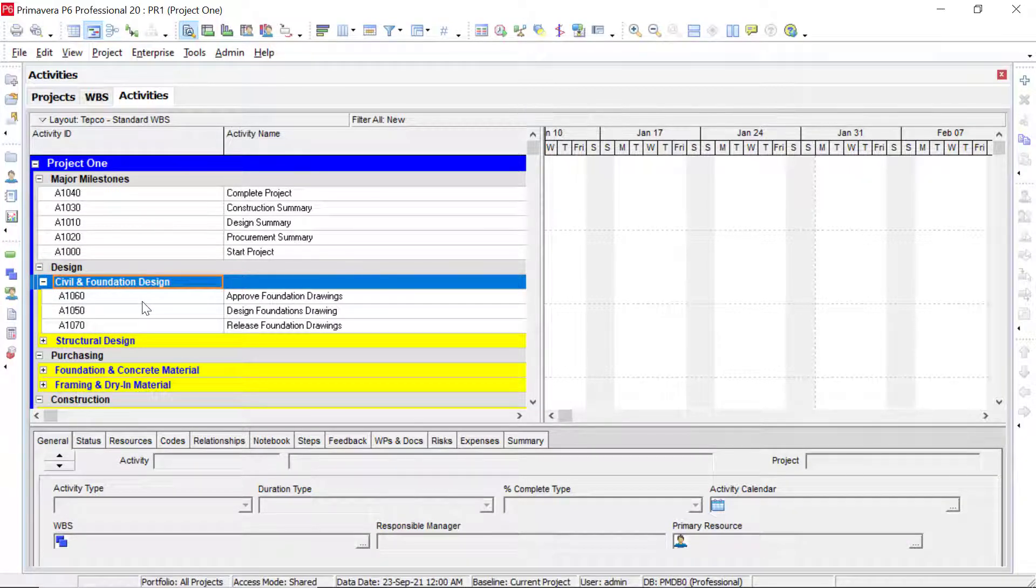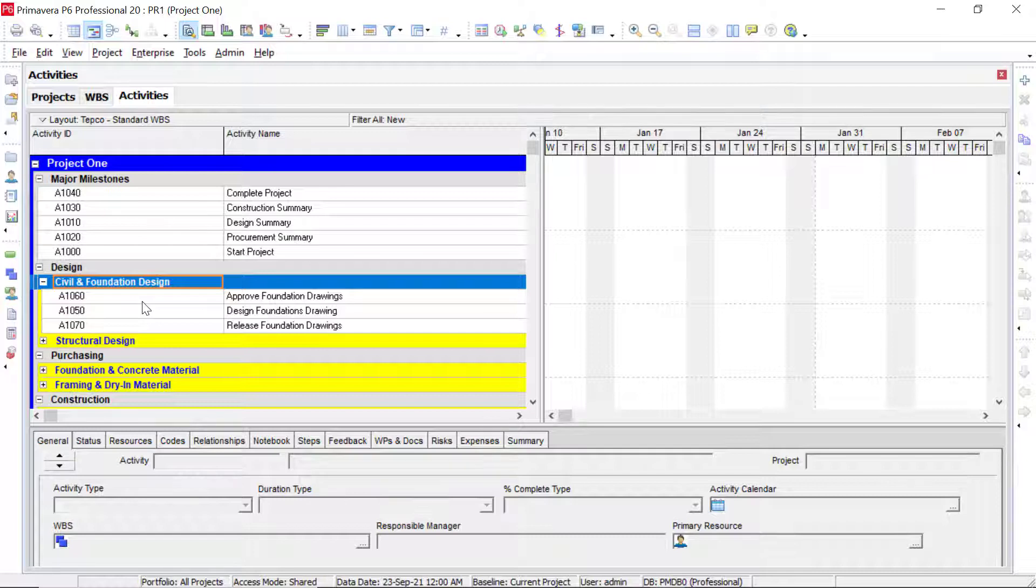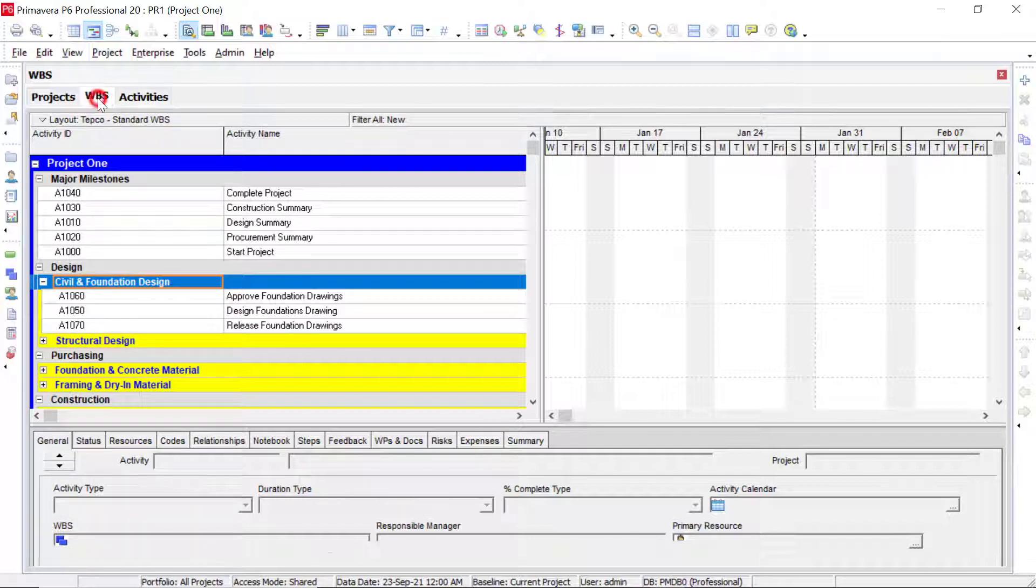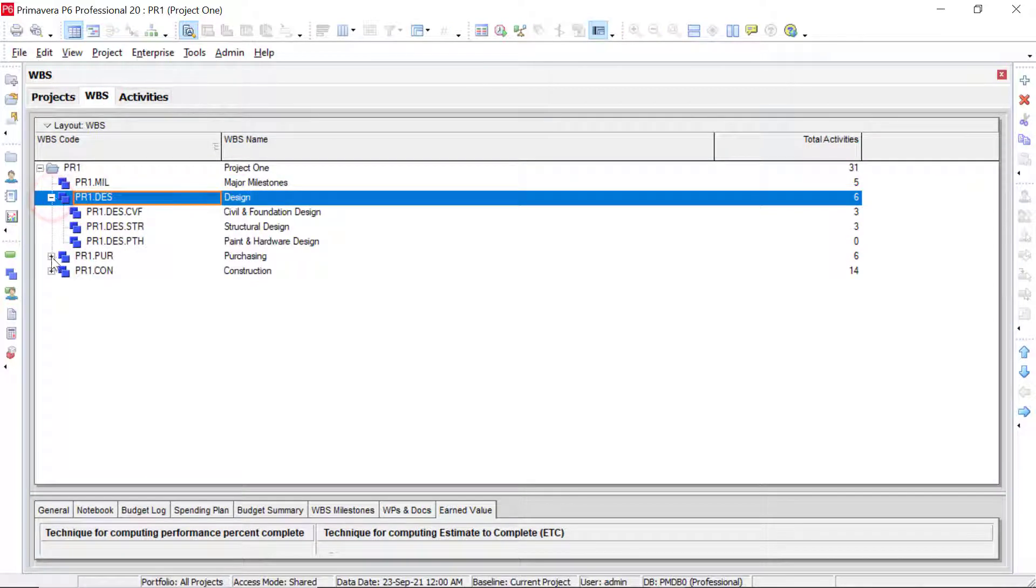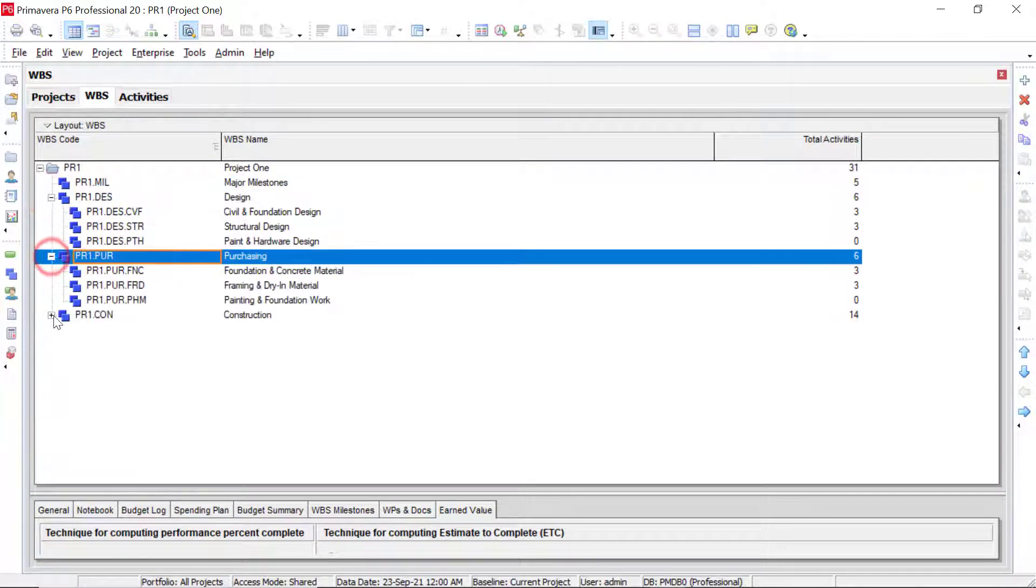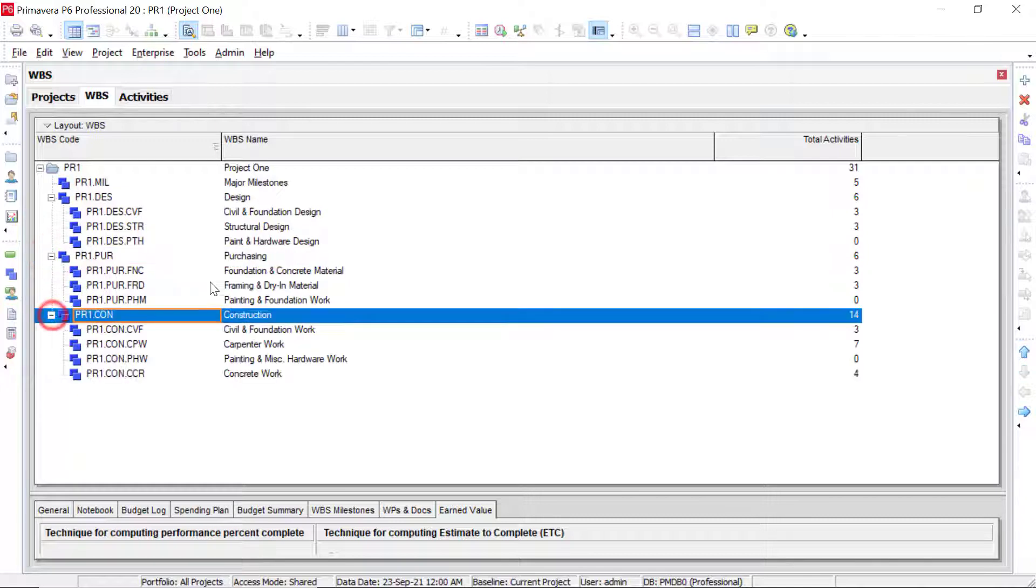In order to make changes to the WBS, we cannot do it within this screen. It can only be done within this WBS element grid. So if we expand what we have, we can see everything that we have added.